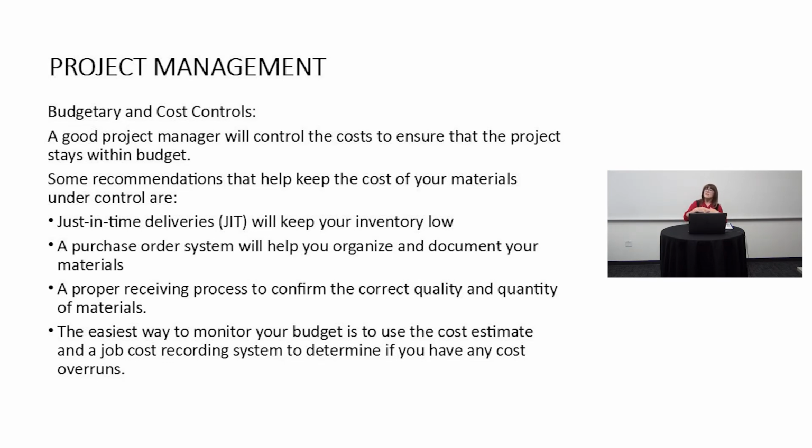So I had 30 days on the schedule with a whole group of projects. I started ordering all the materials, and in they came way ahead of the start time of the project. Soon I had the warehouse overflowing with goods that we were going to need to pay for, but they weren't due to start on the project for another 3 or 4 weeks. So just-in-time deliveries, I learned that concept.